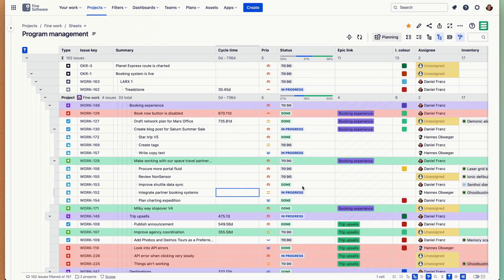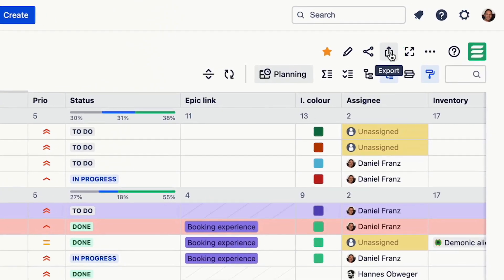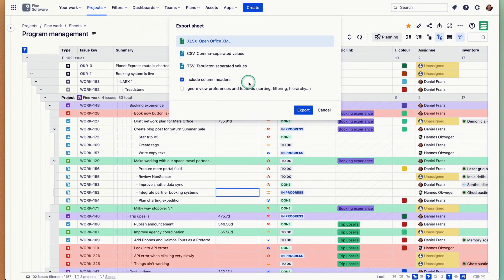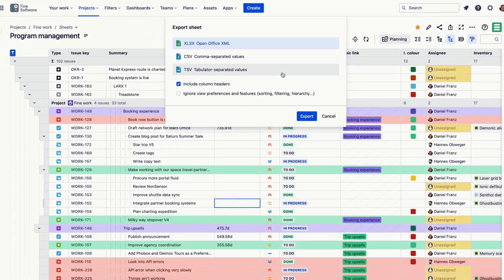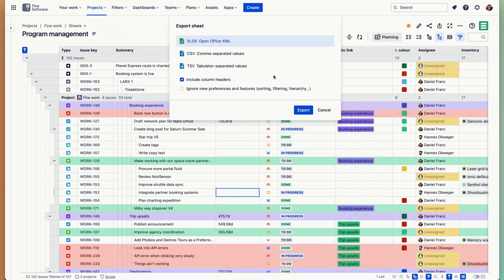In addition to that, just to wrap this up now, if really necessary, if you want to put diagrams or charting on top of this maybe in Excel or Google Sheets, you can export the sheet. You can export this exact scope of data. You can export not just us but also the smart and history columns that are not natively available in Jira. In Jira you can only export up to a thousand issues. Here you can export 20,000 issues, no problem. You can choose the format and then go from there in whatever other application you might visualize these things in.